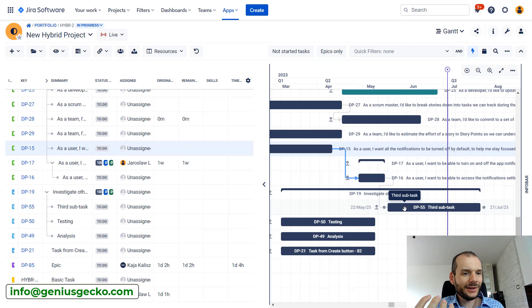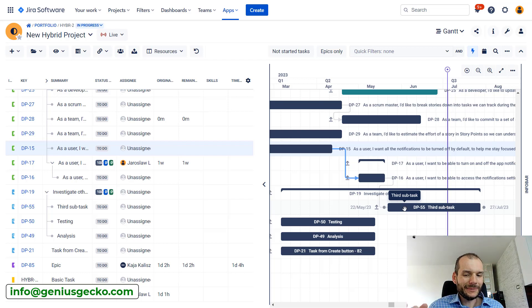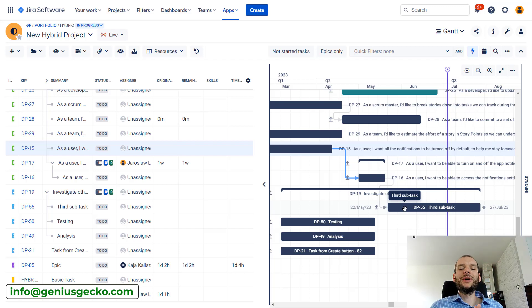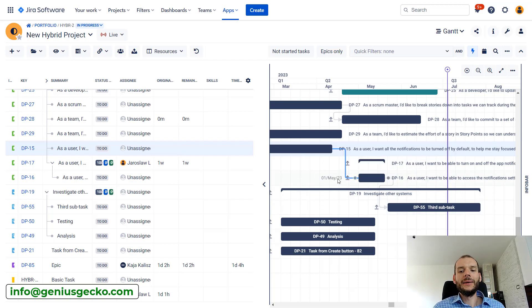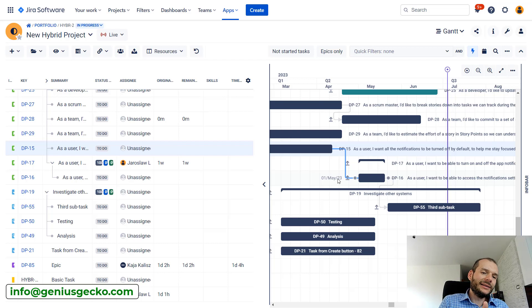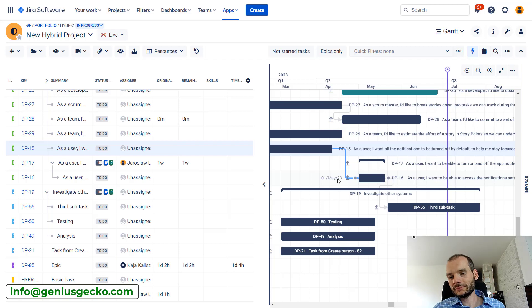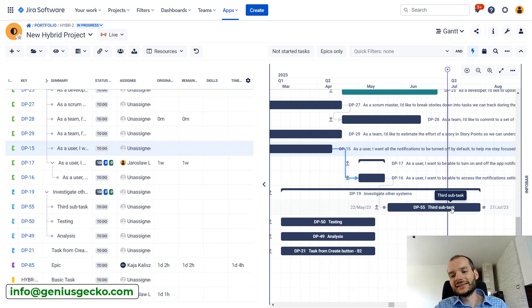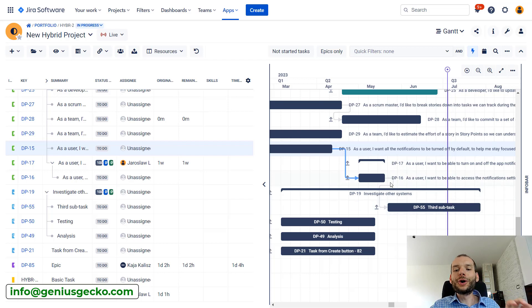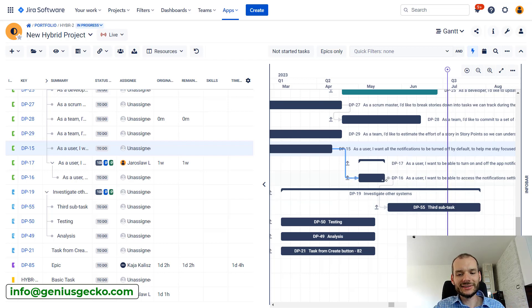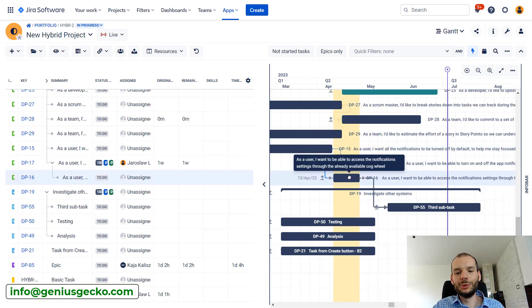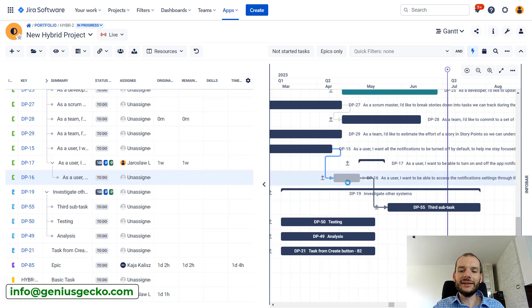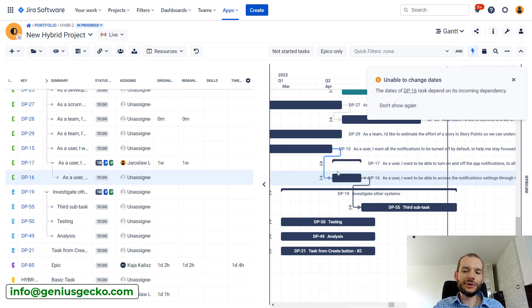And it basically informs us that the dependency is not ASAP mode. Is that bad? Not necessarily. We can still delay the task - all the other ones will be pulled over. The case is that if sometimes tasks get resolved earlier and we can update its end date after it's already resolved, it happens for example because we overachieved.